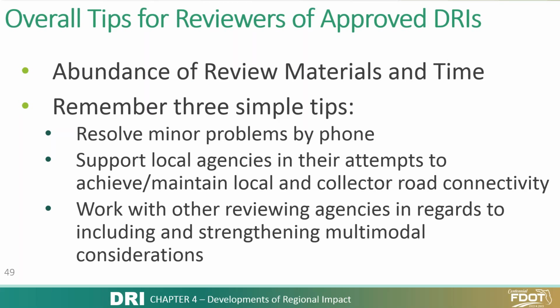Now what I would like to do is just give you some overall tips for reviewers who are reviewing approved DRIs. Overall, there's a lot going on with a DRI, even an already approved DRI. There are mountains of assessments and reports to overcome, and there are time frames which must be kept. Especially if an approved DRI has to redo the process or a portion of the process thanks to a substantial deviation finding from an NOPC, it may take 1 or 2 years to get an amended DO.